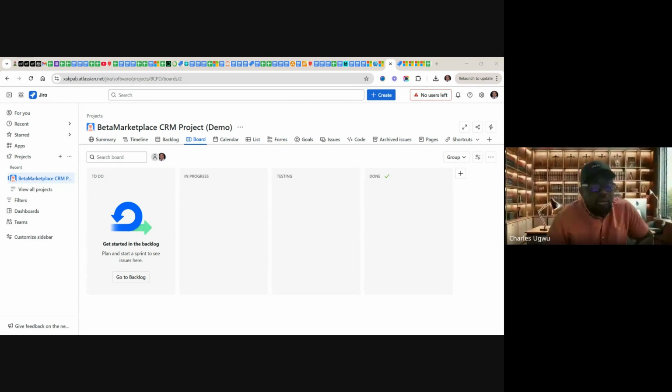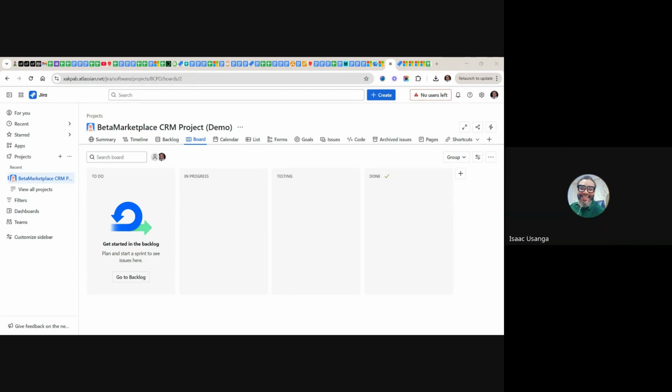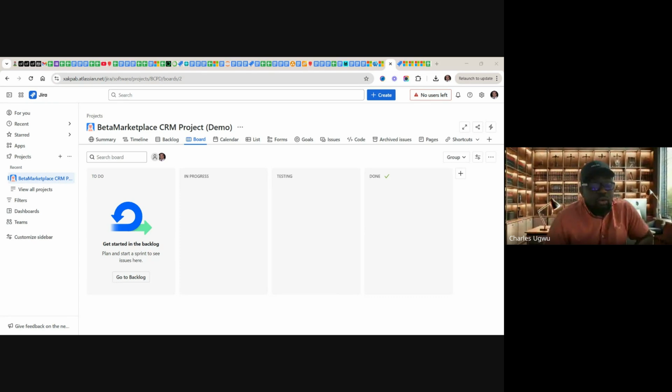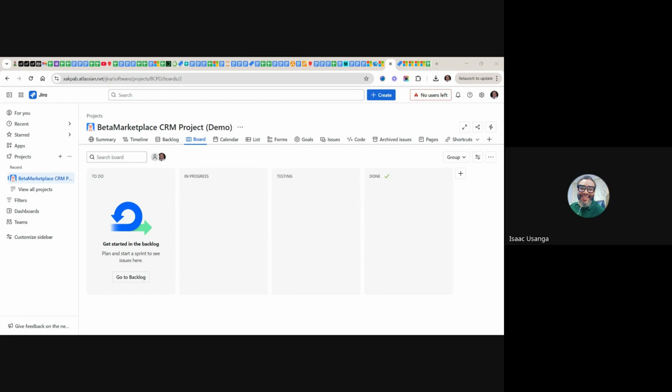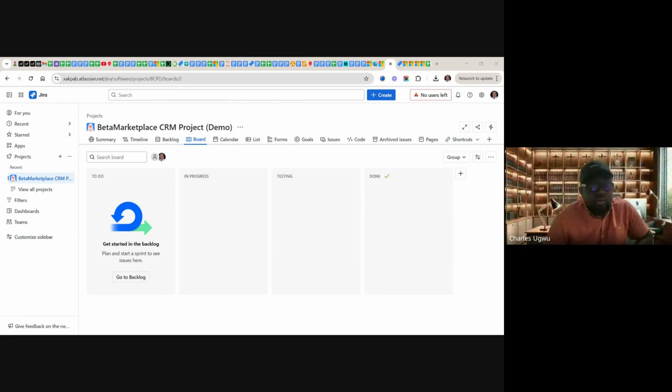No, we are not. It's a bug, and we have sent it to the product backlog, so it's going to form another sprint for the team. So it's part of the next work they are going to do. They are going to prioritize it for the next sprint. It's going to be part of the planning for the next sprint.